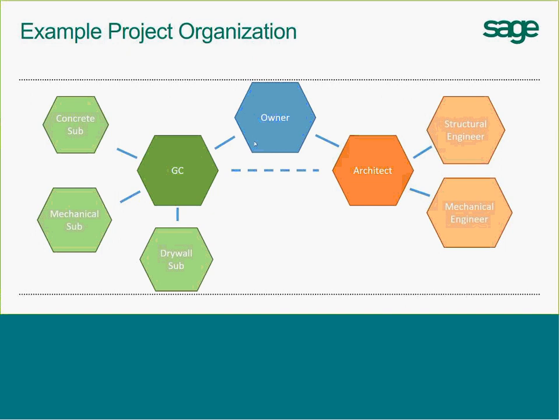From my experience working in construction, one of the things that I always followed was that formal communication needs to follow your contract lines. And that is the way that Project Center works as well. So your concrete subcontractors aren't going to be communicating directly with your architect or the structural engineer. All of those formal lines of communication are going to flow through the contract channels, and that's super important whenever you are having one of these collaboration spaces. You don't want it to become the Wild West out there. You want to enforce some rules and workflows, and Project Center has all that customization that's available to you.